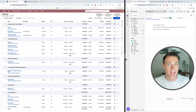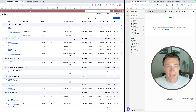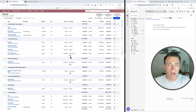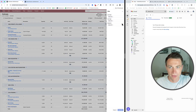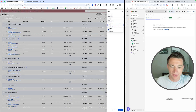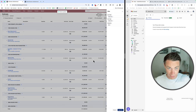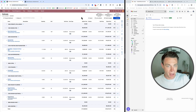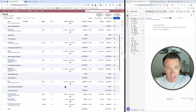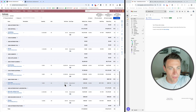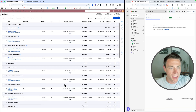When we import, we really want to make use of the cost type and indicate whether it's a bid or an allowance. We can save a ton of time by indicating that 'mark as' field. So if I go to my filter here, I'm going to filter my entire estimate by 'mark as bid.' This is very, very helpful. When I'm importing, I really want to think about what are the items that I might want to be getting bids from. Part of my prep as I'm setting up BuilderTrend would be to go through these items and create bid packages for them.